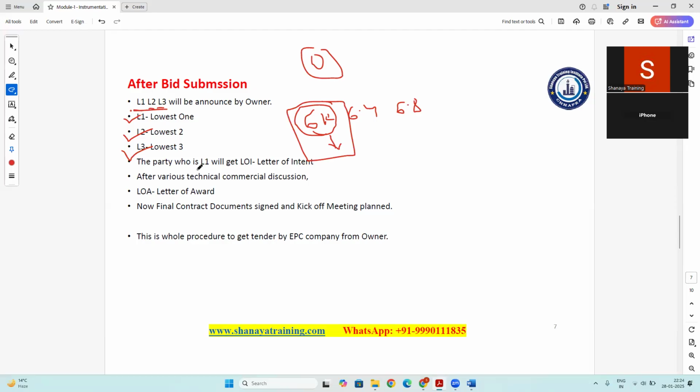So now the L1 party will get the LOI, letter of intent. They will provide the letter of intent that, okay, we are going with you since you are the L1. After various technical and commercial discussions, they will release the letter of award to that EPC company. Now the final contract document will be signed. Kickoff meeting will be planned and the project will be started. So this is the whole procedure to get a tender by any EPC company from the owner.